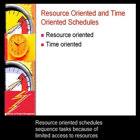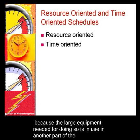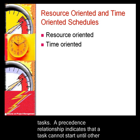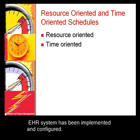Resource-oriented schedules sequence tasks because of limited access to resources needed to complete a task. For example, construction of a wing of the hospital may be delayed because the large equipment needed is in use in another part of the construction. Time-oriented schedules focus only on precedent relationships among tasks. A precedent relationship indicates that a task cannot start until other tasks are done. For example, training of staff on how to use an EHR, or electronic health record, cannot start until the EHR system has been implemented and configured.